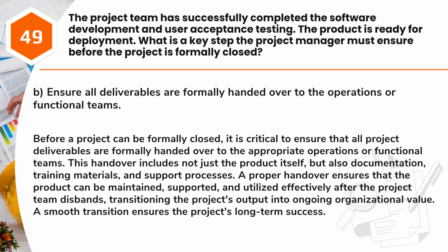This handover includes not just the product itself, but also documentation, training materials, and support processes. A proper handover ensures that the product can be maintained, supported, and utilized effectively after the project team disbands, transitioning the project's output into ongoing organizational value. A smooth transition ensures the project's long-term success.